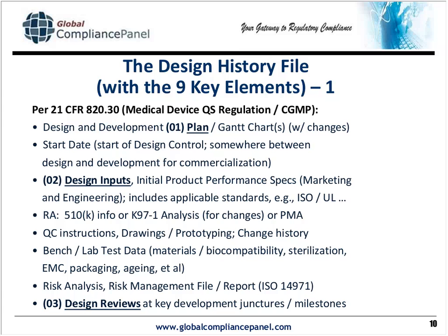But then you also should be compiling all of these as you go into a design history file, as opposed to waiting at the end and trying to pull it all together after the fact, which becomes very painful, time-consuming, and frequently, as a result, many things are left out or dropped. But by doing this up front, you make sure each element is addressed when it needs to be addressed.